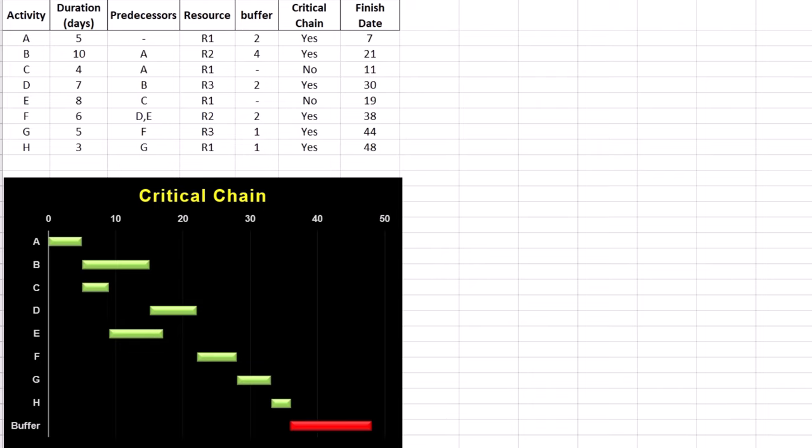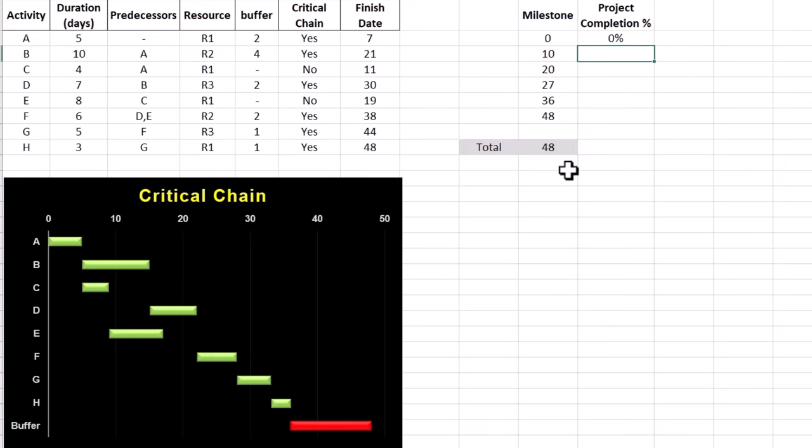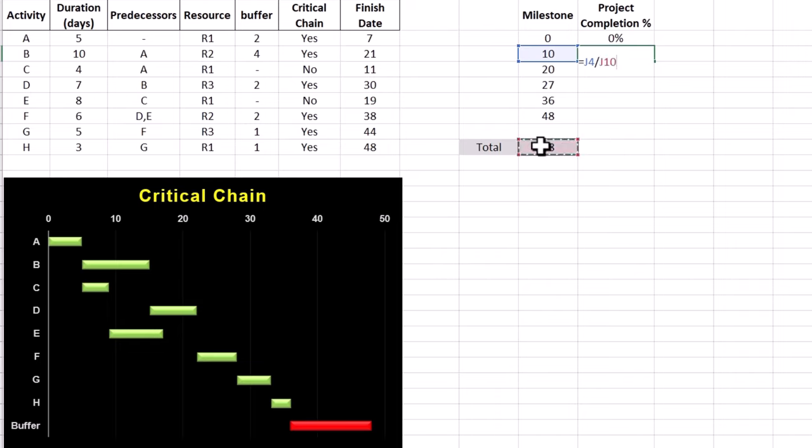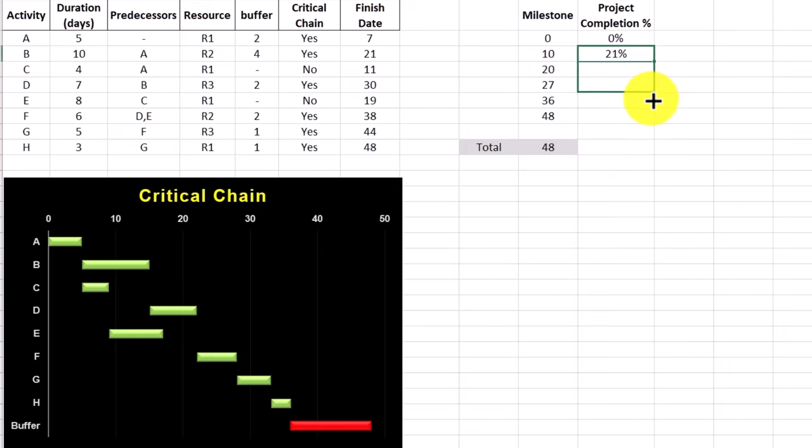We should define tracking milestones and in our project dates 0, 10, 20, 27, 36, and 48 are chosen. Milestones in real projects should represent stages where significant progress or evaluation occurs. For each milestone, calculate the project completion percentage. For example, on the 10th day, the completion percentage is 10 divided by the total duration of 48, which is 21%. The formula is then replicated for other milestones.